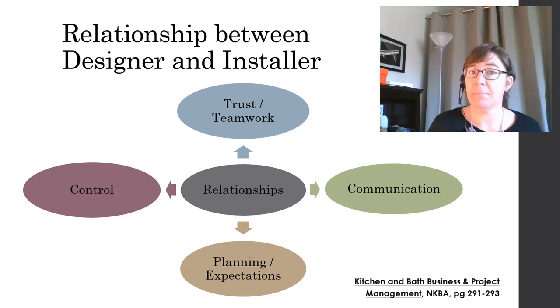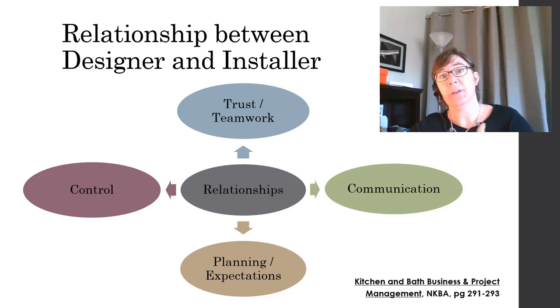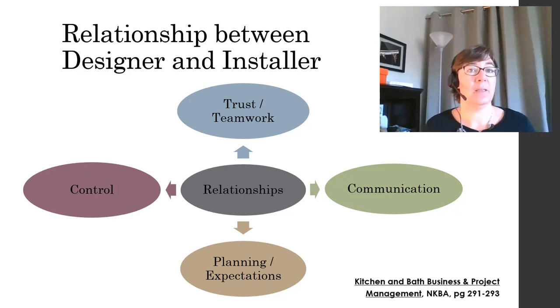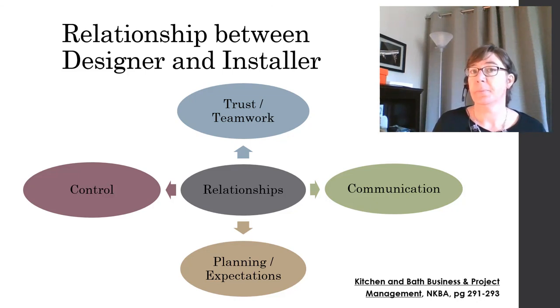Maybe they've got some input in some decisions, but they're not the one in general control. After the project has moved on into construction or installation, that control might swap and be 85% the contractor or installer and maybe 15% the designer.